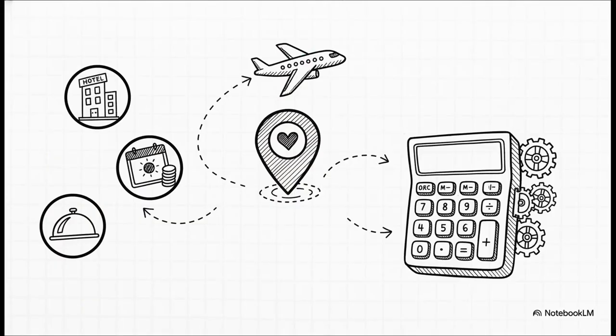Now you might be wondering, what about jobs out of town? Toggling the job type to remote instantly opens up the auto calculations for travel. You plug in travel days each way, daily per diem per tech, hotel per night, and airfare.